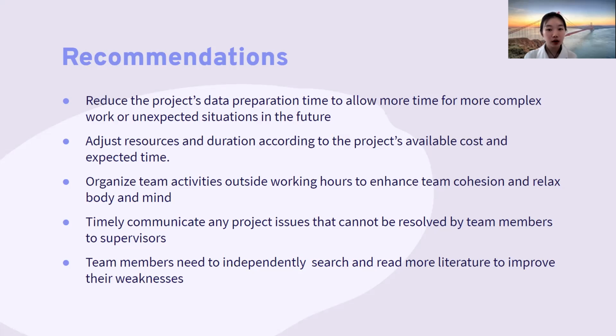Furthermore, there are some recommendations for doing a project. First, we need to minimize the data preparation time for a project to allow more time to deal with more complex work or unexpected additional work requested by clients in the future. Then we need to adjust the project's resources and duration based on clients' requirements. When the project's aim is to complete the task faster, regardless of extra cost, we can allocate more resources for the project. However, it is not advisable with the aim of cost saving.